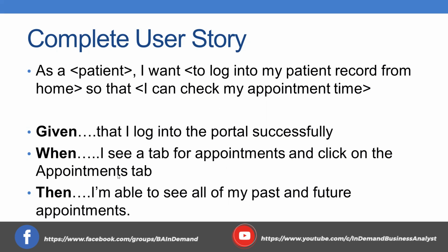But lots of companies are starting to adopt this additional acceptance criteria because, again, it provides a lot more clarity and guidance on how this should look. What that does is it reduces, on the back end, finding defects or putting this user story back on the product backlog because we can't call it done. So the definition of done becomes a little blurred when we're seeing just the user story. Okay. Thank you. All right.